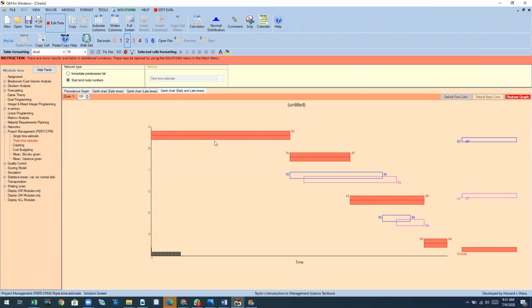Again, it presents us the critical path, which are bars in red, and the other path which are not so critical because there could be some delay from early start and late start. So there are some slack that you can use to, if you need to reallocate or reschedule the use of resources to more critical activity, you can do that because you have some room for delays. Okay. Anyway, so that's the chart.